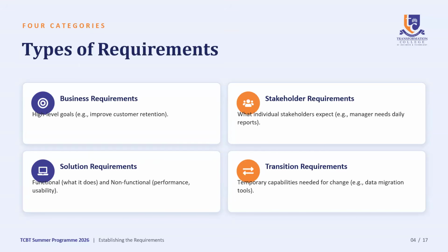Right now, you do not want to take the business offline because you are creating a solution for them. So there has to be a transition plan that allows you to transition the business from its previous state to a future state that would be far more effective. And for that, you need to, as a business analyst, do your research. If it has to do with databases, you have to do your research. Okay, what do they need for transition? Okay, data migration tools, parallel running systems that do not allow them to go offline.